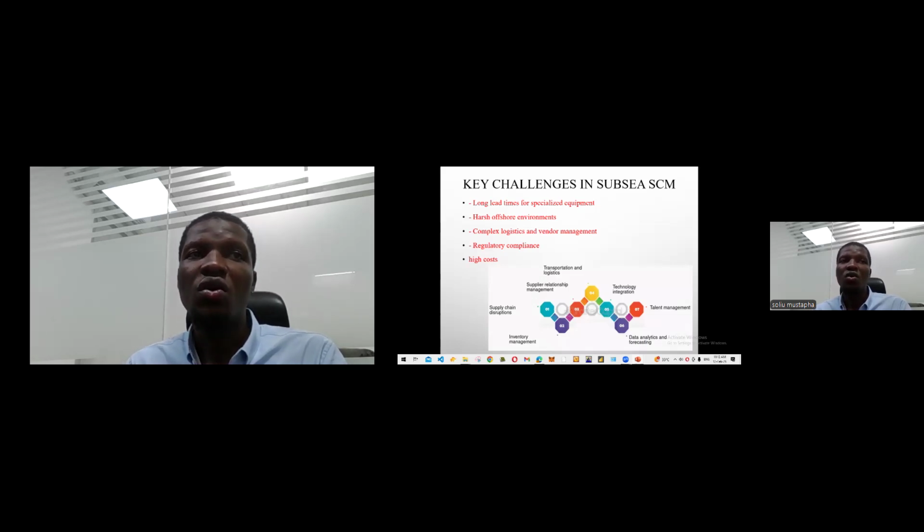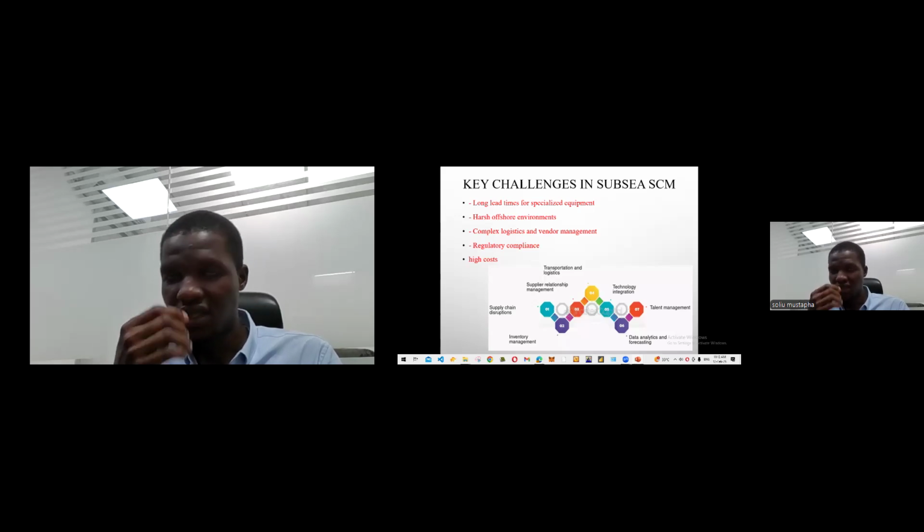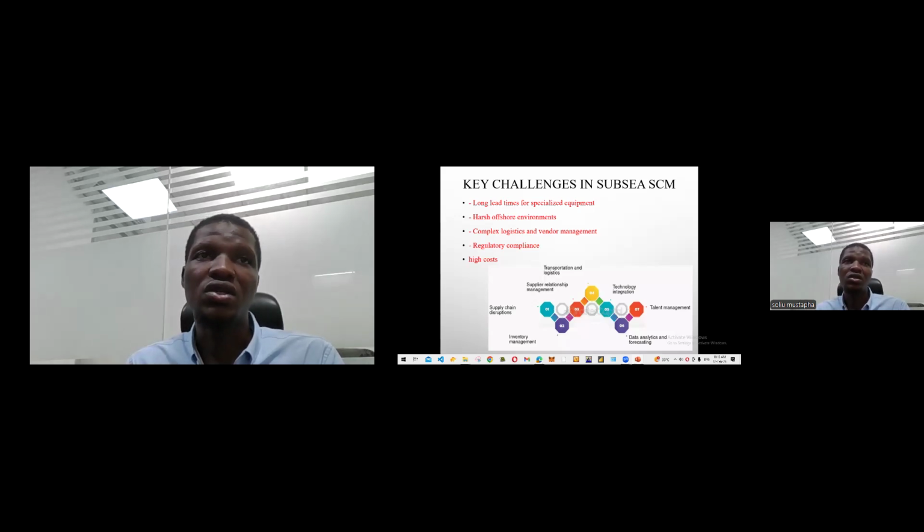The first one is long lead times for specialized equipment, the procurement of long lead line items like tree, completion equipment, BOP, manifold, and the likes. So procurement or bidding for these long lead items is one of the challenges in subsea supply chain management.